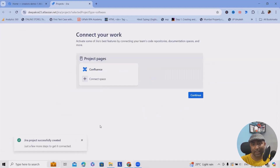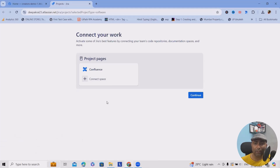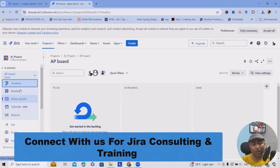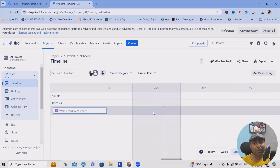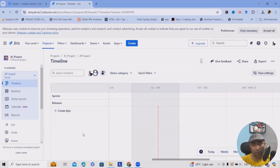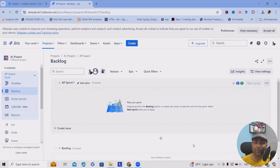Once done, it will take a few seconds and then give you a popup. If you already have a Confluence account and want to integrate it, you can do so — or you can do it post-project creation as well. Once you click Continue, this will navigate you to the active sprint page. You'll also see the timeline or roadmap, where you can view detailed roadmaps navigating through weekly, monthly, and quarterly phases. In the backlog section, all items created or prioritized for further development will be added here, maintained by the product owner.